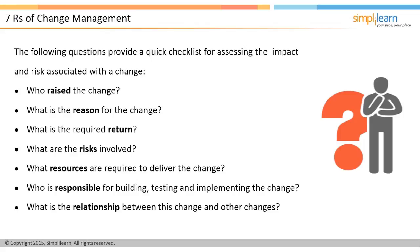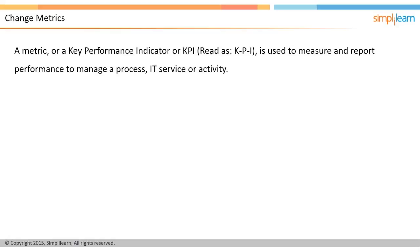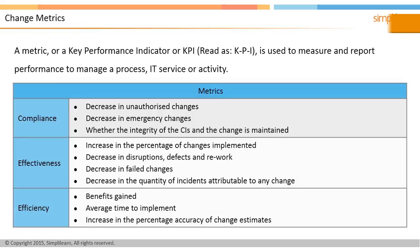A metric or Key Performance Indicator, or KPI, is used to measure and report performance to manage a process, IT service, or activity. KPIs are selected in a way that ensures efficiency and cost effectiveness. Some of the metrics used in change management for compliance include: decrease in the number of unauthorized changes, decrease in the number of emergency changes, and whether the integrity of the CIs is maintained.